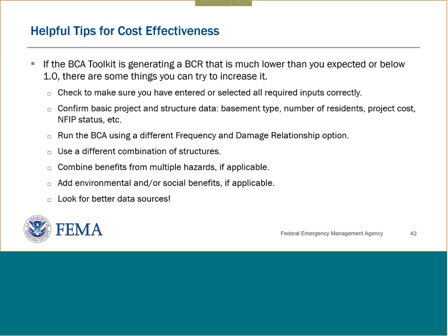You can combine benefits from different hazards. For example, if you have historic damages, if you're doing a structure retrofit and it's been damaged by flood and earthquake, you can include benefits from both of those hazards and put them in the benefit cost analysis. Again, the tool will prompt you if you can add environmental benefits or social benefits. And the last thing, it says look for better data sources. Use the best data that you can find.